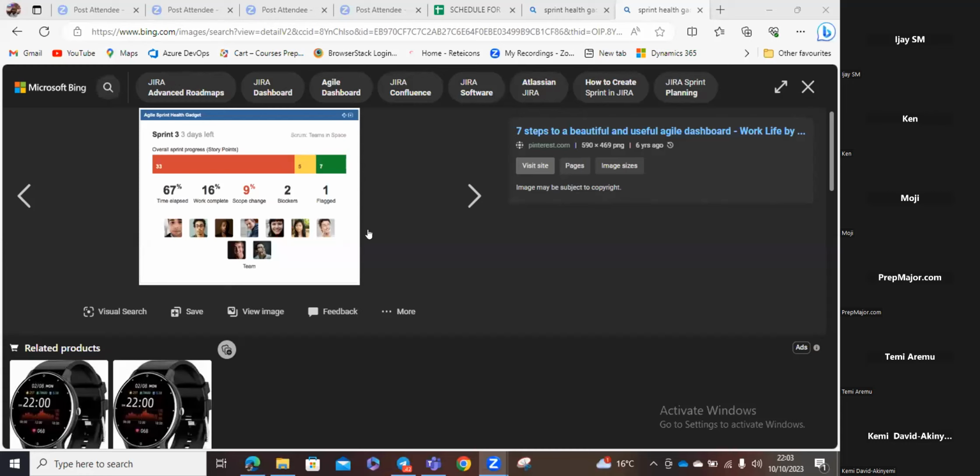And once that happens, you can see it, and the teams are saying, oh, the business needs this, we will need to work on it. But the same business that needs it are the same ones that wanted you to complete your sprint goal. Remember? And once that sprint goal is not completed, they will ask you questions again. So I always prepare my chart to talk to them to say why we've not completed the sprint goal is because you brought in all this, 1, 2, 3. Now we've been able to do just a percentage of what we planned because we focused more on the unplanned work. So I'm throwing it back to them to say we need to reduce the things.